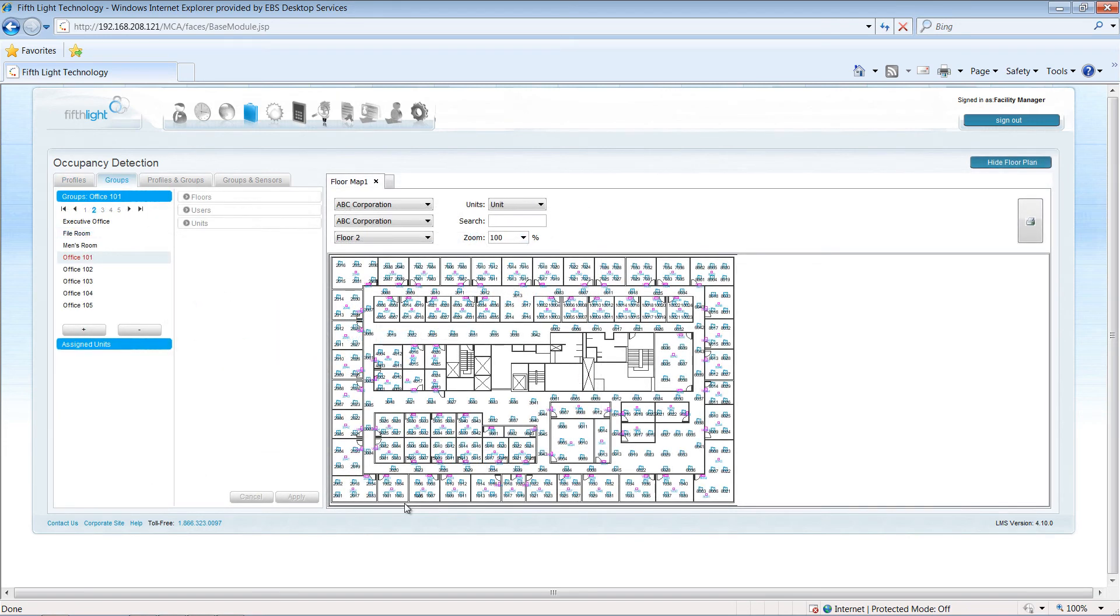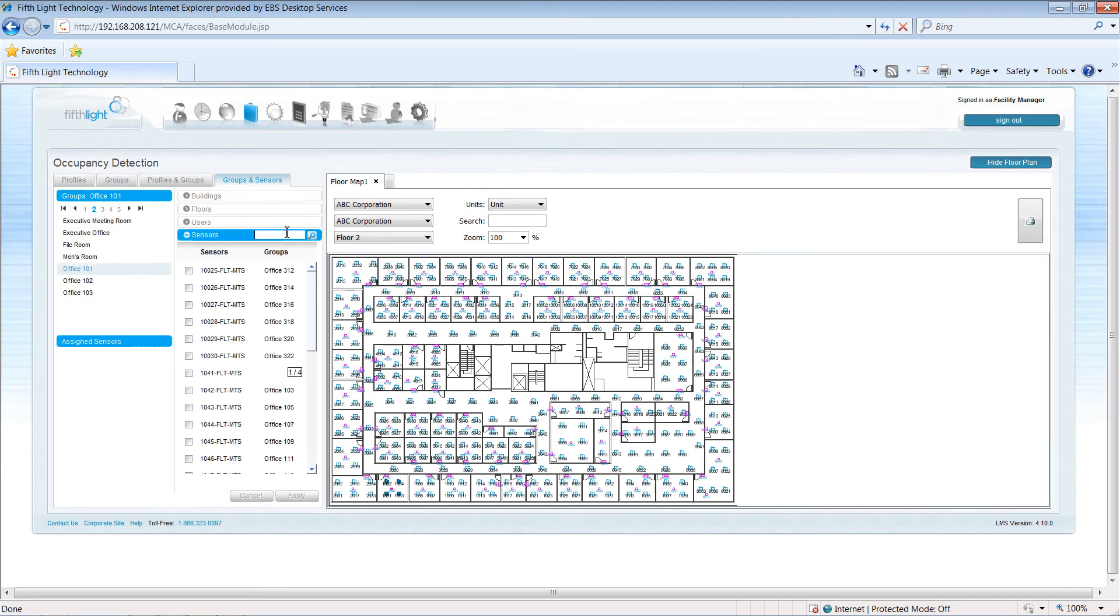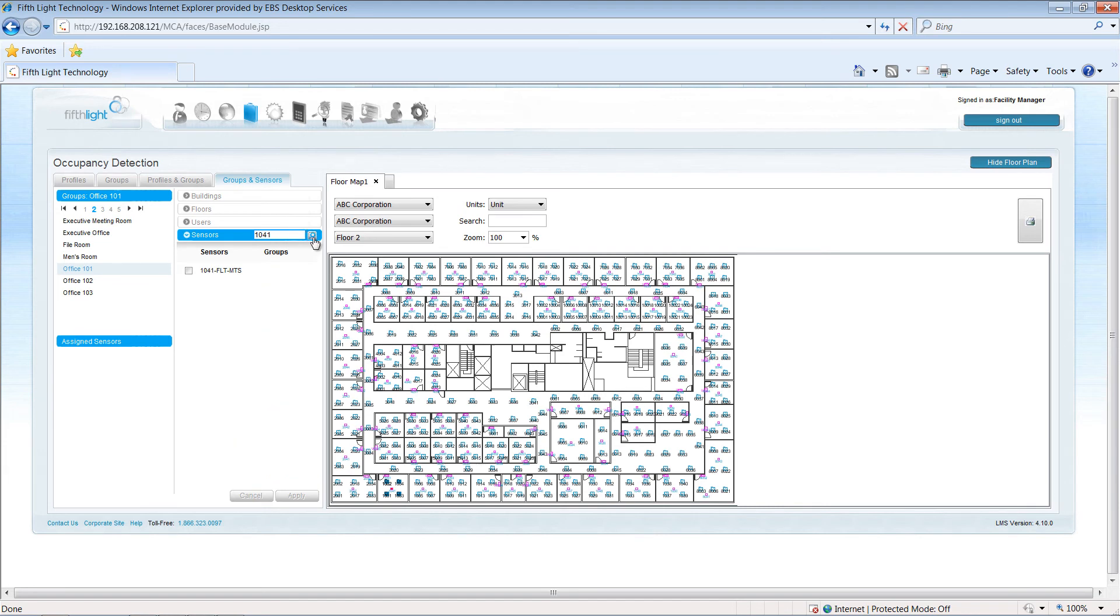During commissioning, the commissioning technician will create groups of lighting for each area in the facility that needs to operate from an occupancy sensor. The technician will also associate each lighting group with the appropriate sensor or sensors that will operate this space.